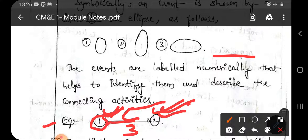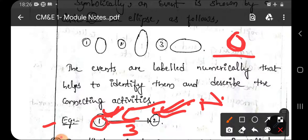Just remember: an event is represented in circle or elliptical format and has no duration. An event represents either the state of start of an activity (event 1) or the state of completion of an activity (event 2). This is about event.